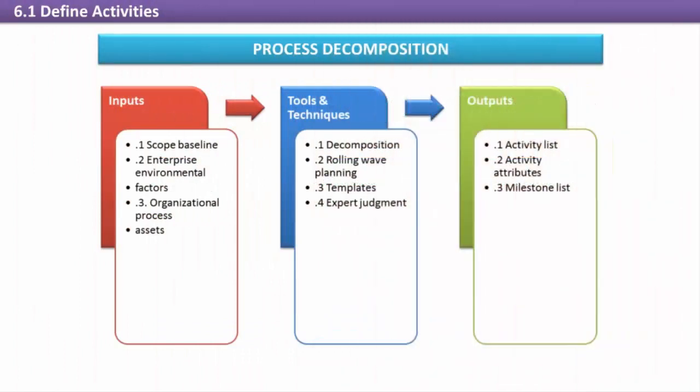Define activities. The goal of the first project time management process, define activities, is to create the complete list of project activities, called the activity list, which itemizes all the tasks required to produce the work packages. Defining activities is an iterative process performed together by the project manager and the project team members by further decomposing the WBS work packages. Since the activity list and WBS can be looked upon as companion documents, each activity should have a unique identifier that correlates it to the WBS work package.